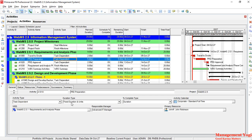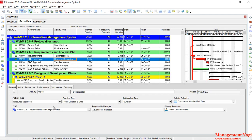A task dependent activity will be dependent on the activity's calendar. Depending on the activity calendar — which is the corporate standard time full time — the activity will be scheduled, and the duration and dates will be determined.